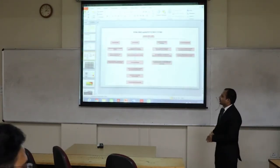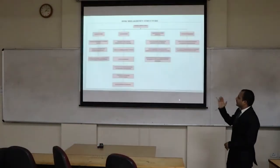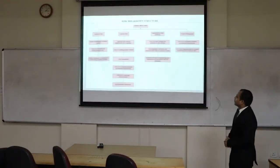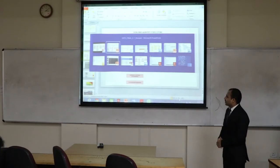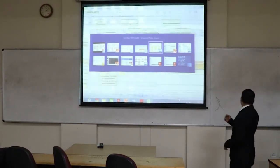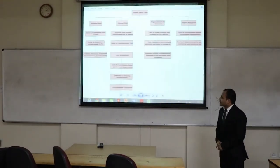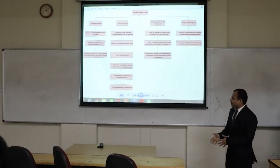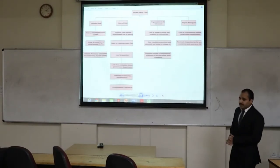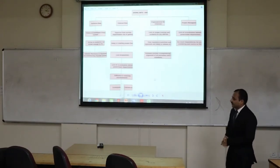This is the risk breakdown structure for each technical, external risk, organization, project management. For example, the communication system—if there is no communication system among the different departments, this can lead to the failure of the project because each department has to be approached for approval of different tenders.